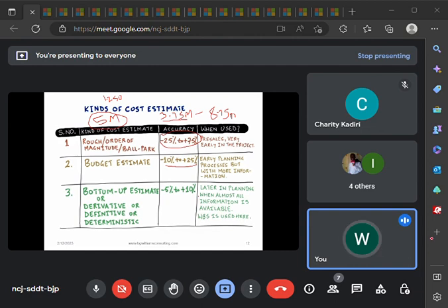That is why you can see this word, we say the latter, while the second one is the early planning stage. So when you are now more detailed in your plan, then the accuracy level will be between -5% to +10% of your actual amount or the amount you have in mind. Do you get that, please? I hope that is clear.